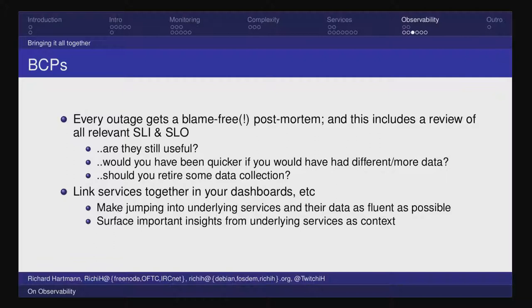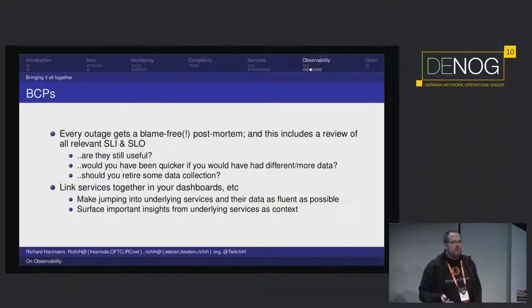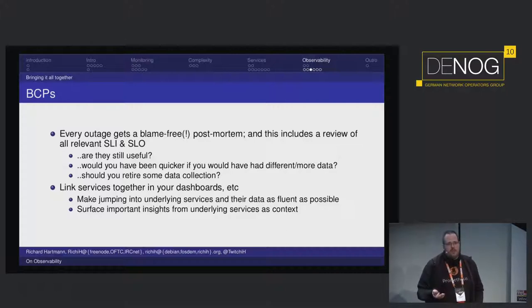In a post-mortem, you should be very clear about what went wrong, in what order, and who did something — not to assign blame, but just to be explicit. So you can go to those people and ask what they did specifically, in what order. Post-mortems are great — an outage is a chance to learn about your system. You can review your service level indicators, objectives, and agreements. Would you have been quicker with different data, more data, maybe less data, maybe better compressed data? Maybe you can even kill some data that was just noise while you were looking for the real signal.